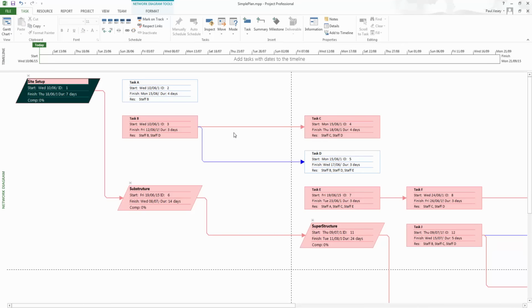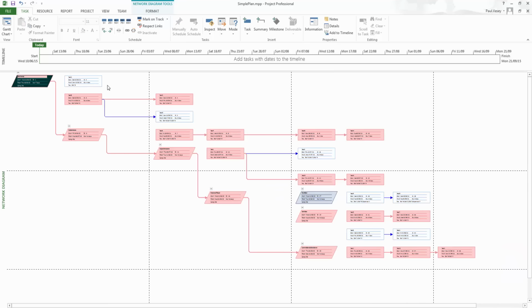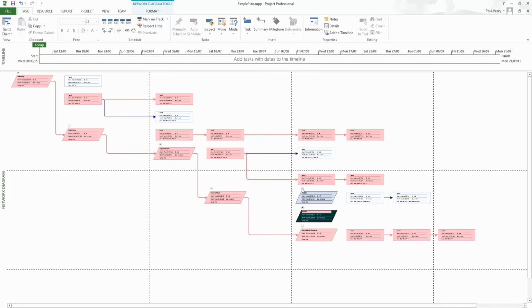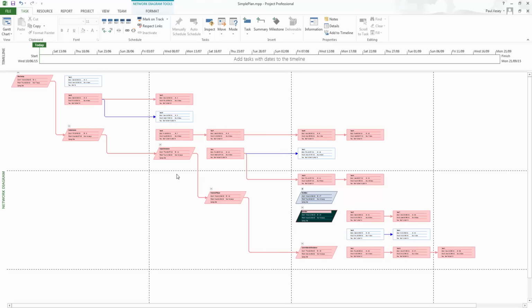So we can start to see this network diagram. We can see here that most of these activities are critical, i.e. they're popping up in red. We have our non-critical activities, so A, just hovering over, D, K, this is a roll up here of the partition, so that's non-critical. And we have two non-critical activities underneath here. And again, the roll-ups actually work in here as well. But just be aware that you can hide information that you might want in that process. So there we go, that's a nice way of looking at it.